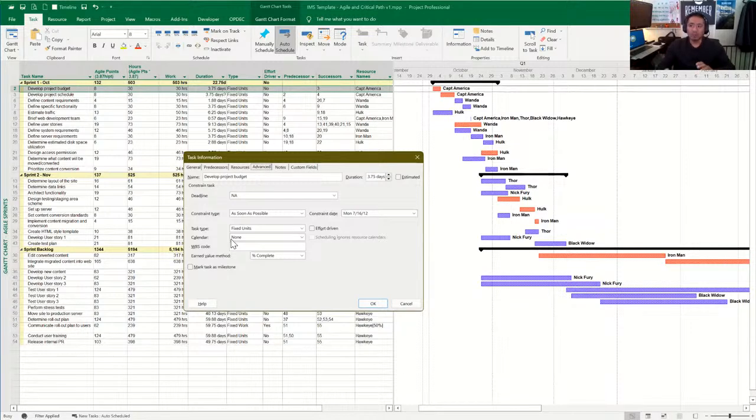The reason I'm always saying that is because if you manipulate what you want in the project options, it will automatically assign it to all tasks that you're creating. So you won't have to mess with these areas in your schedule. It would just be generated from the project options.